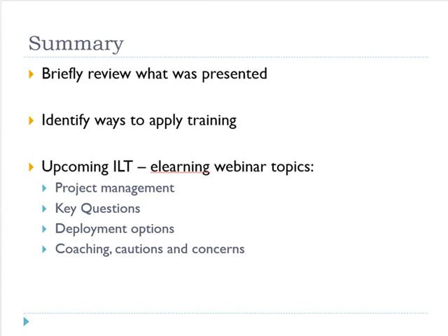Do you use any service level agreements with internal clients? I'm not sure what we're talking about by service level agreements, but with internal clients, what we try to do is get them to commit to a process document that we have created, especially within our company, that outlines the process which we will follow and the level of expectations of both the subject matter experts as well as the ID team, and try to get their buy-in, so to speak, and their level of involvement and what we're going to expect from them as we go through this process and what they can expect from us.